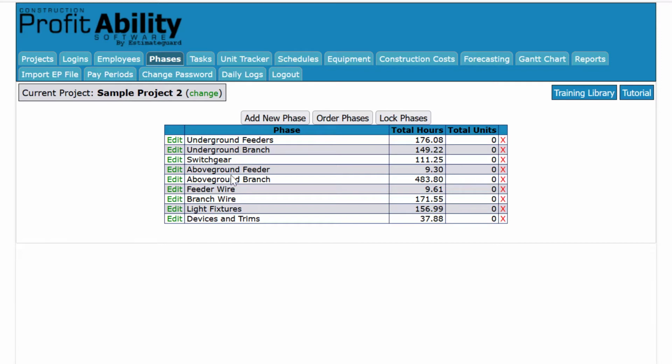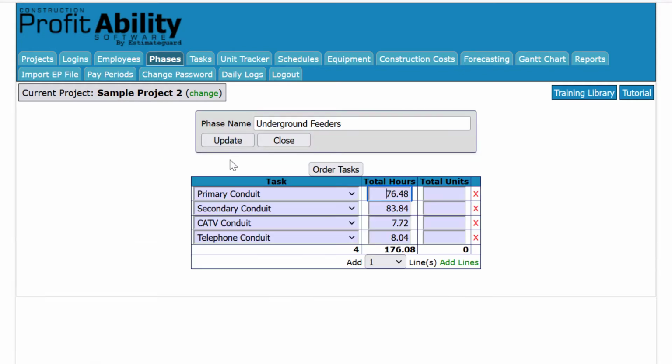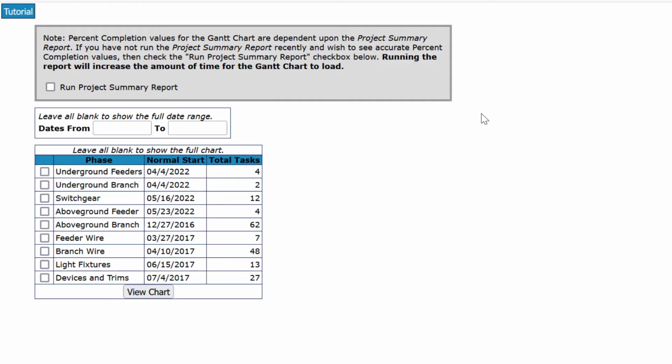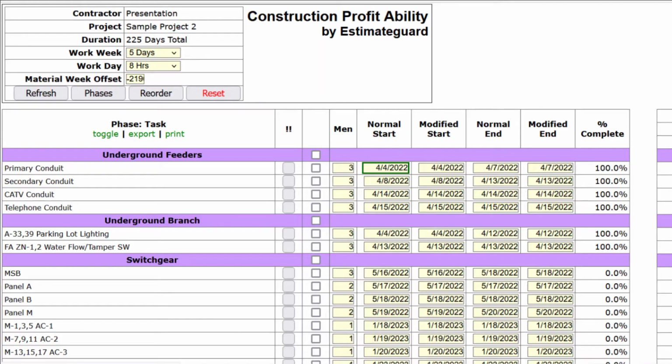We're going to put these in the order to create our to-do list, what some people may refer to as a work breakdown structure. Okay, once that's done, then we can go into each separate phase of construction, and we can also order our tasks in the order that we want to build the project, right? And of course, that will build the structure for our Gantt chart.